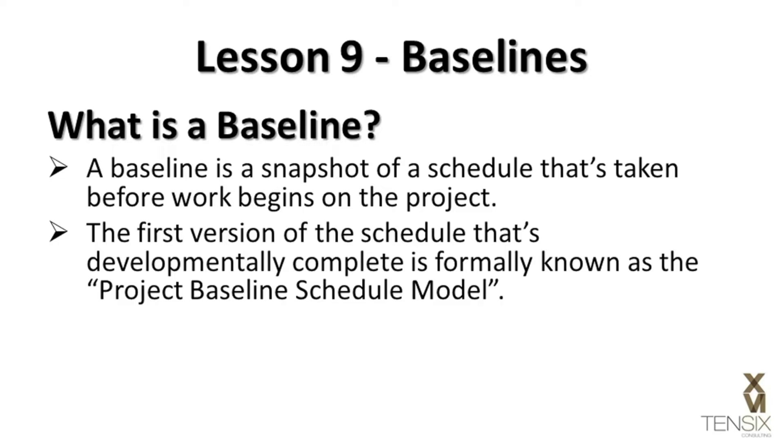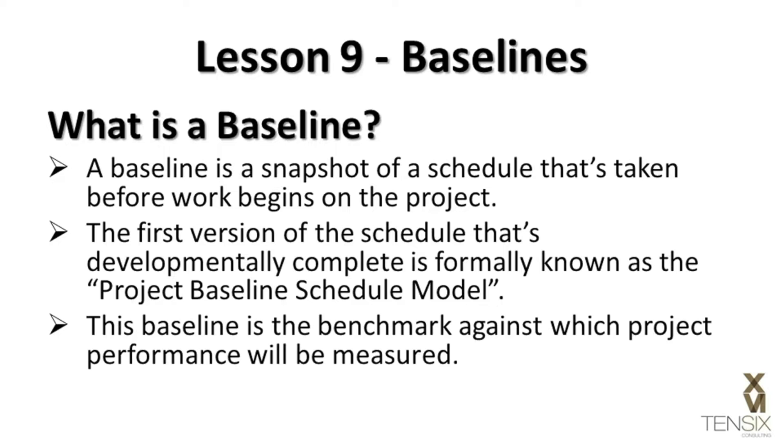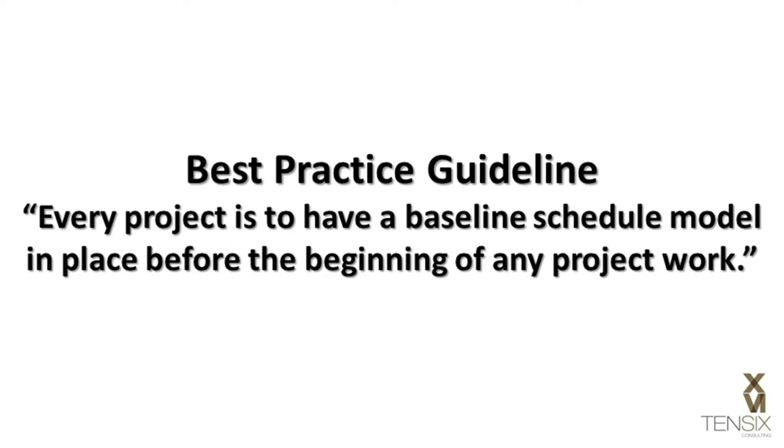In Primavera P6, this is referred to as the Project Baseline. This baseline is the benchmark against which project performance will be measured. It's generally accepted best practice that every project is to have a baseline schedule model in place before the beginning of any project work.